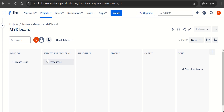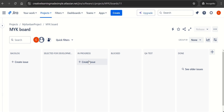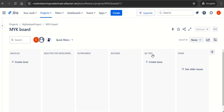Let's make the window a bit wider. So we now have: Backlog, Selected for Development, In Progress, Blocked, QA Test, and Done. From the backlog or to-do list, we select tickets for development. Team members will pick them up as In Progress. Any ticket where we are blocked or have impediments goes into Blocked. QA Test is for testing, and once testing passes, it goes to Done. We can always configure and create new columns based on our project needs and workflow.